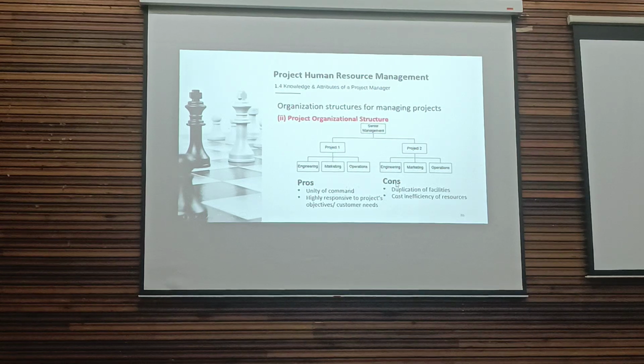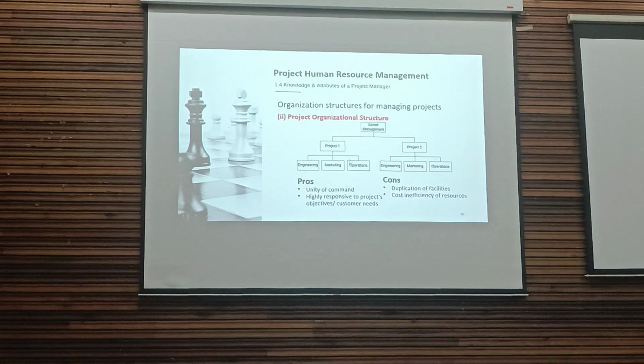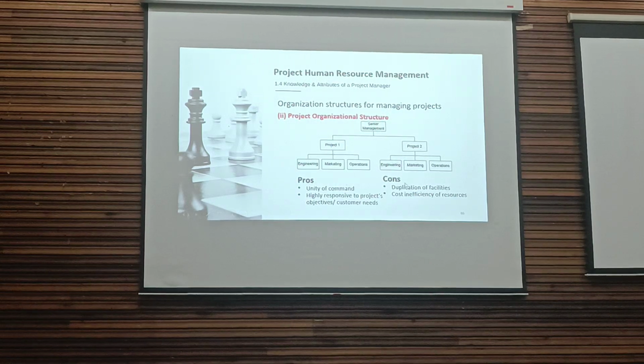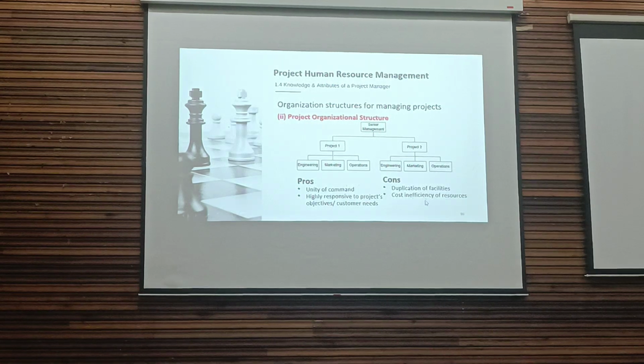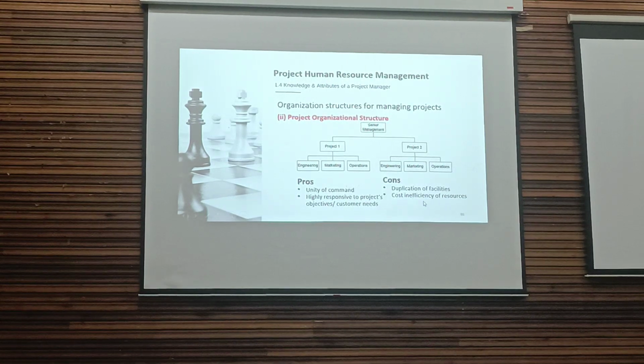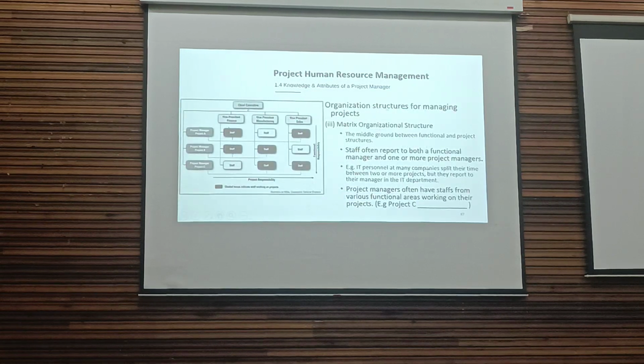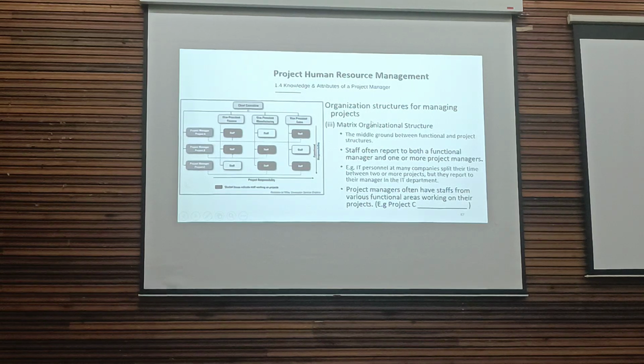So the cons are duplication of facilities. You can see there's a marketing department here, and there's also another marketing department in project 2. So duplication of facilities can lead to cost inefficiency. I'll skip this one. This is not common.